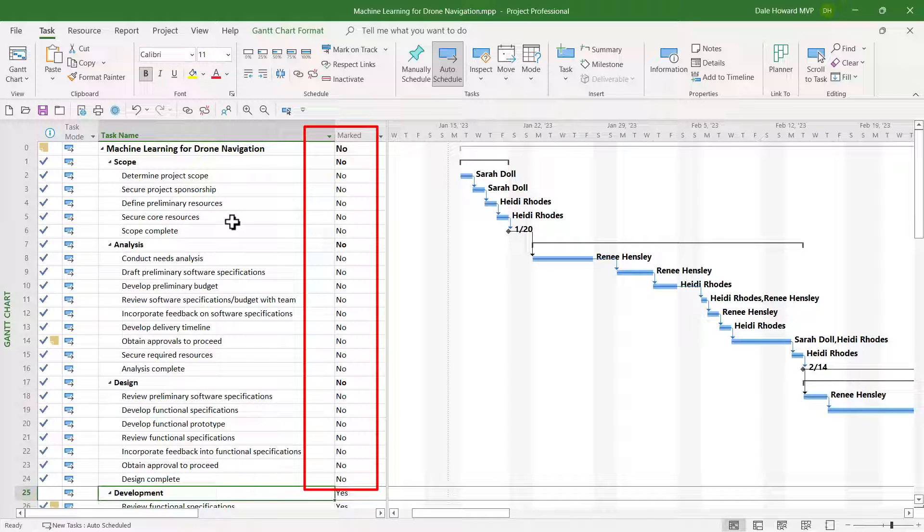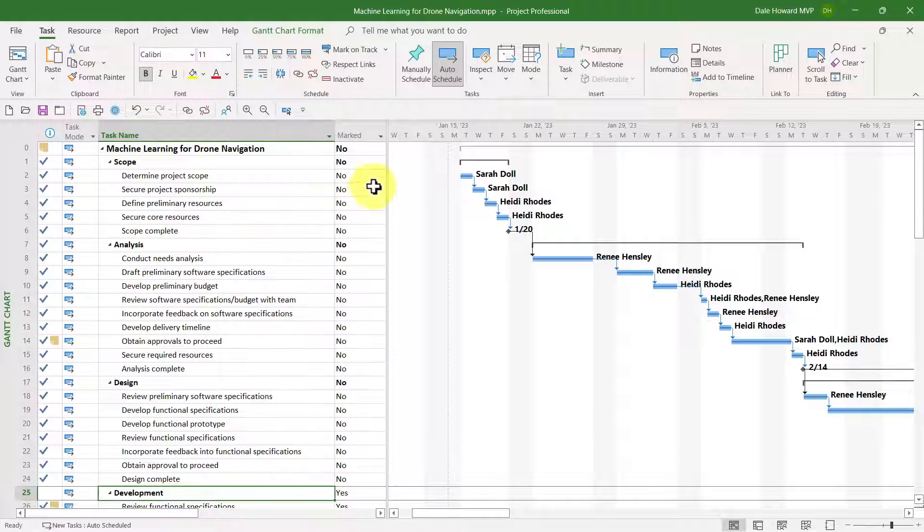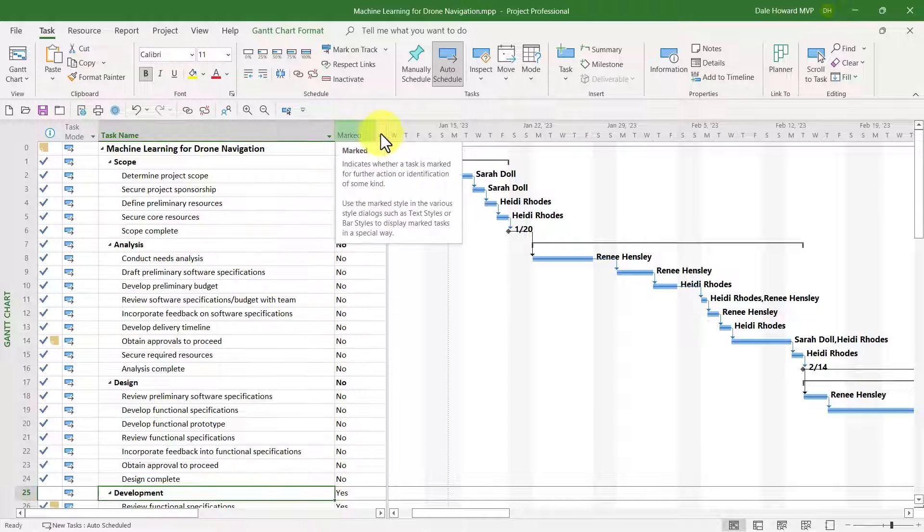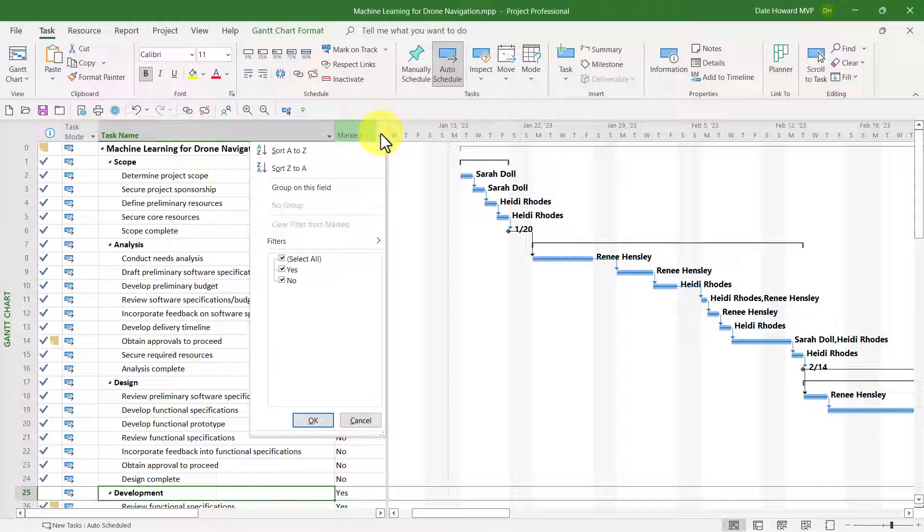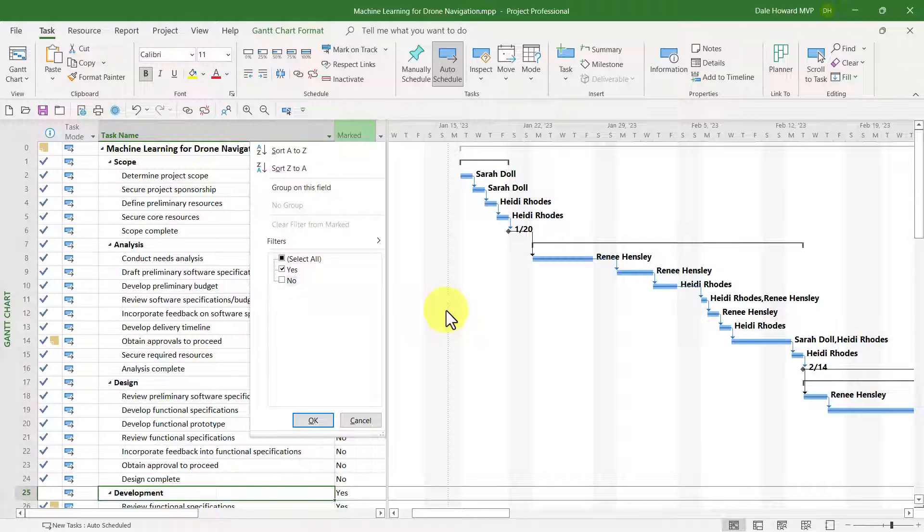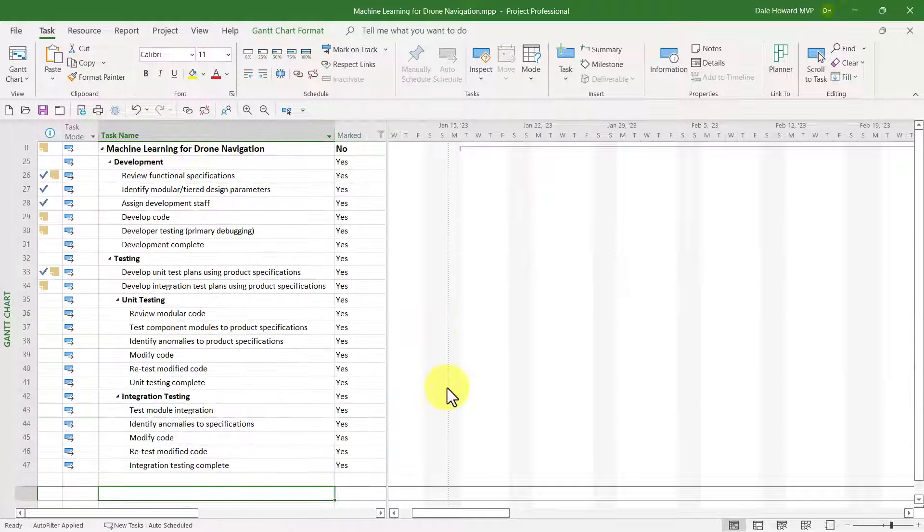Then, to display only the tasks with a Yes value in the Marked field, do this. Click the drop-down arrow in the Marked column header to display the Auto Filter menu. In the Auto Filter menu, deselect the No value to leave the Yes value selected, and click the OK button.